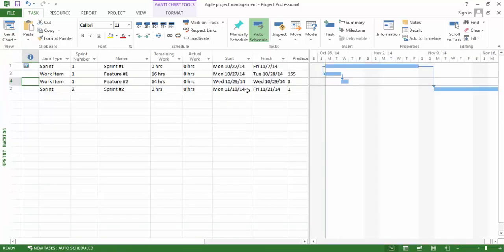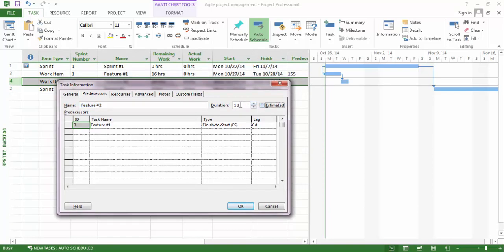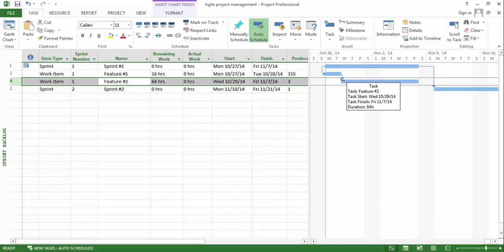So in the sprint backlog you can see that it will have a start date of 29th because it's going to be 1 day after the end of the previous feature, and it will have 60 hours work, but in the Gantt chart it is only 1 day's work because, as I told you, it is a flaw of this template. We should manually synchronize them, which is painful, but we have to do that. So now we can see that it is correctly scheduled in the Gantt chart. It will take 8 business days, which is exactly 64 hours to finish.